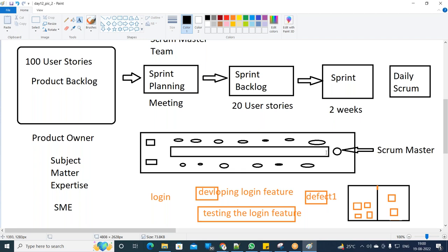Then the scrum master will either note down all those tasks or ask somebody to note them down. All the tasks which have been noted down will be user stories, or sorry, sticky notes, created by somebody in the team and added to the left hand side. Similarly, each person has to stand up and tell what has been done so those tasks will be moved to the right hand side, and what they are planning to do on that day, somebody will note it down, and all those will become tasks and be added to the left hand side after the daily scrum has happened.